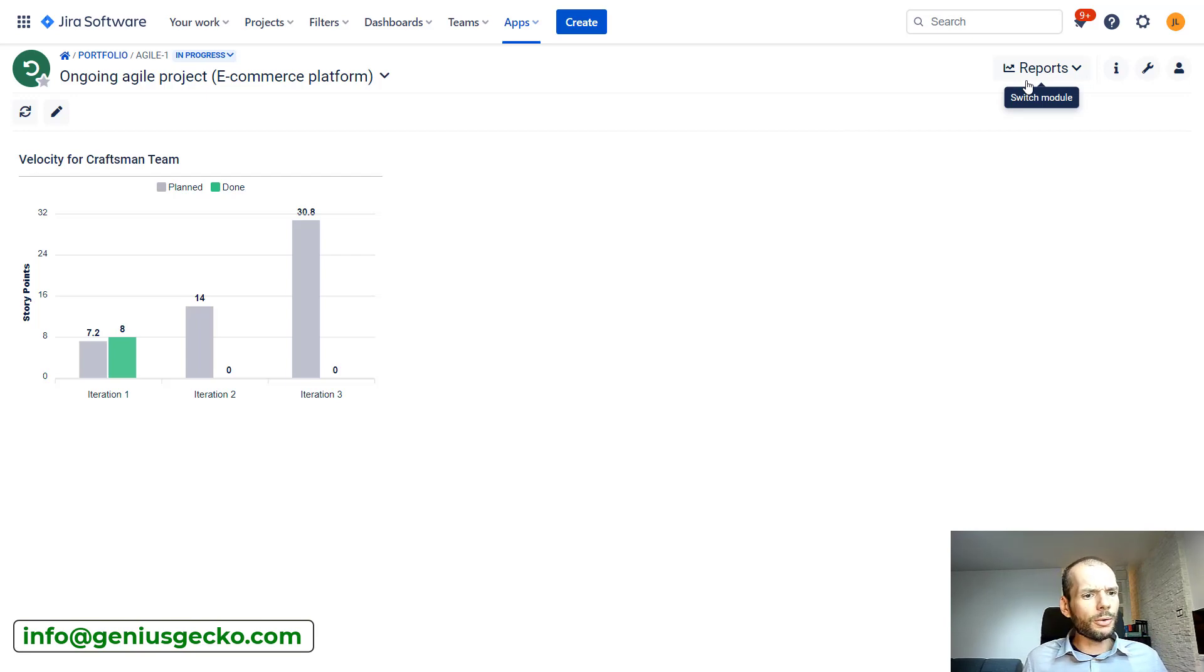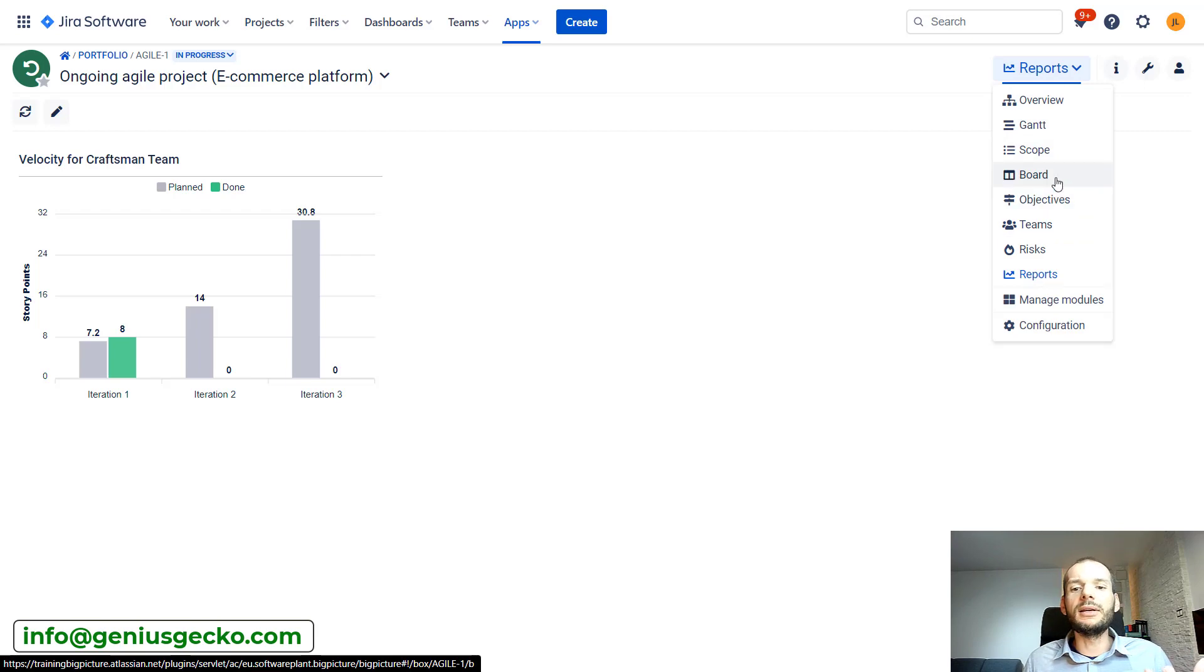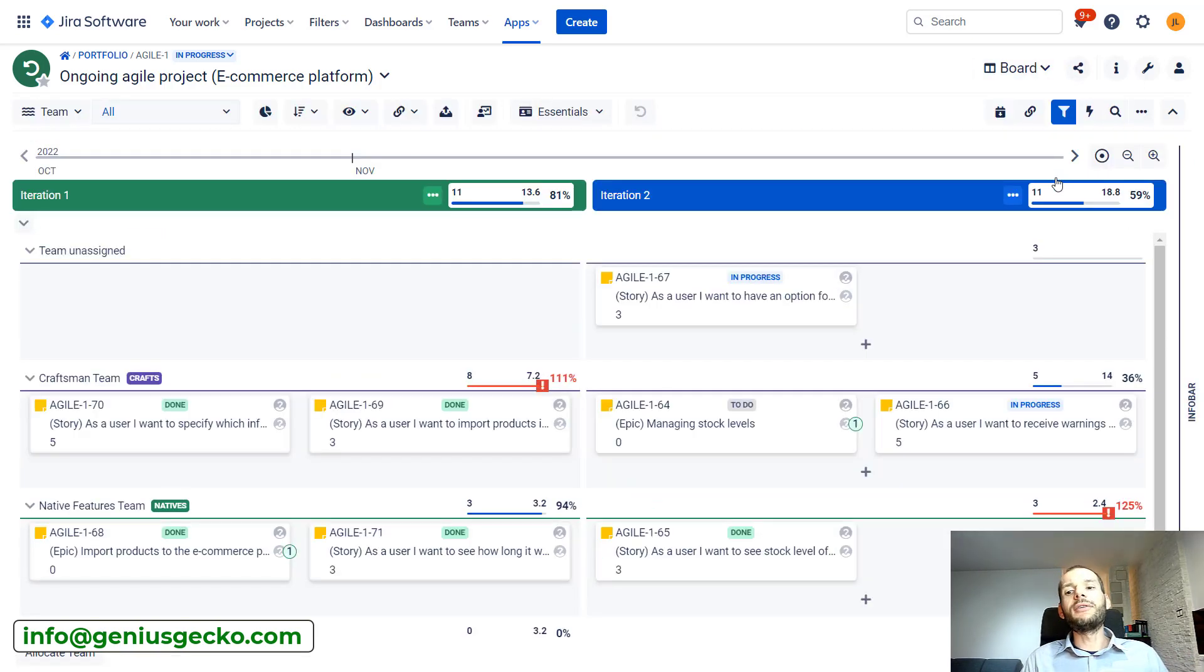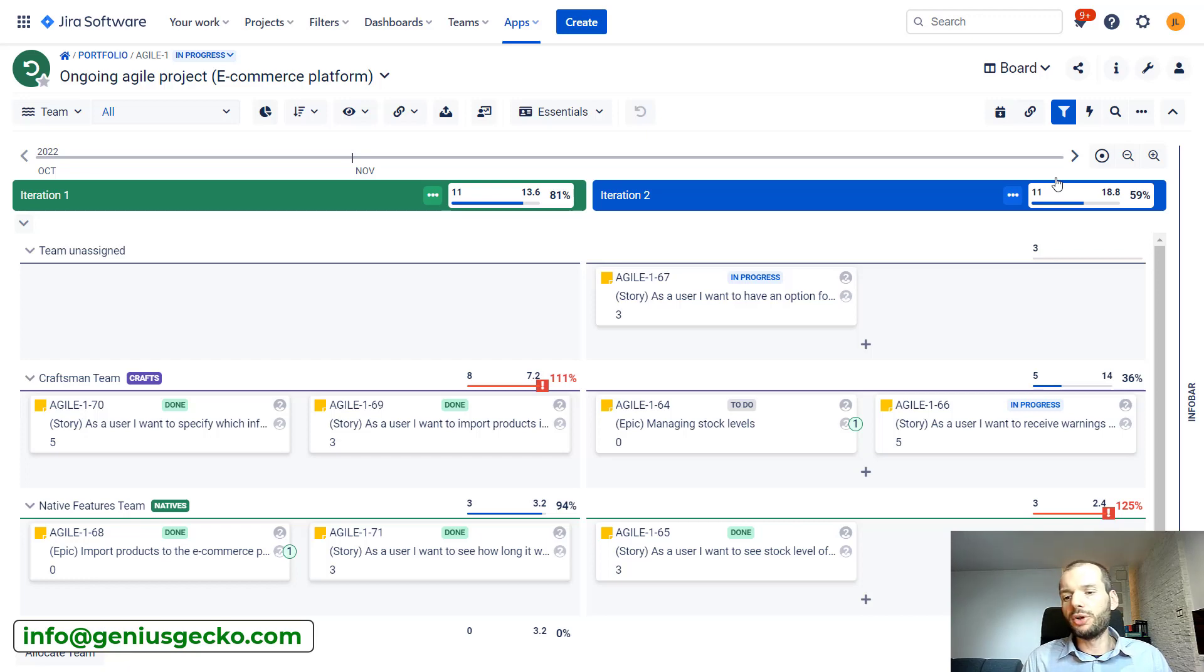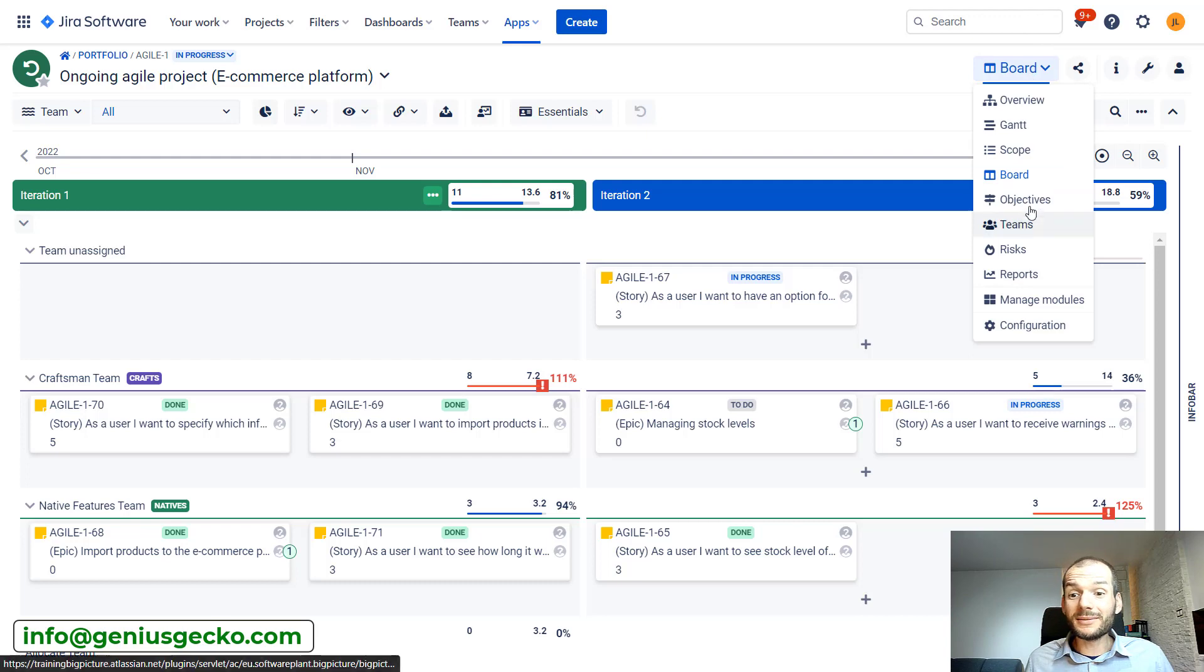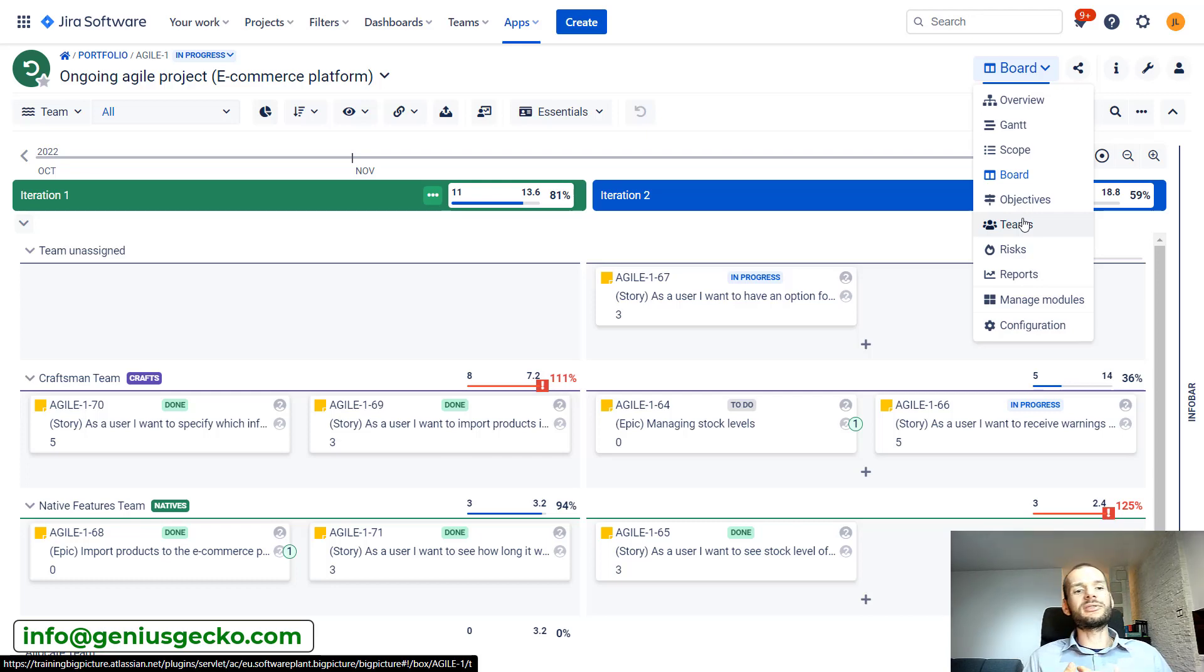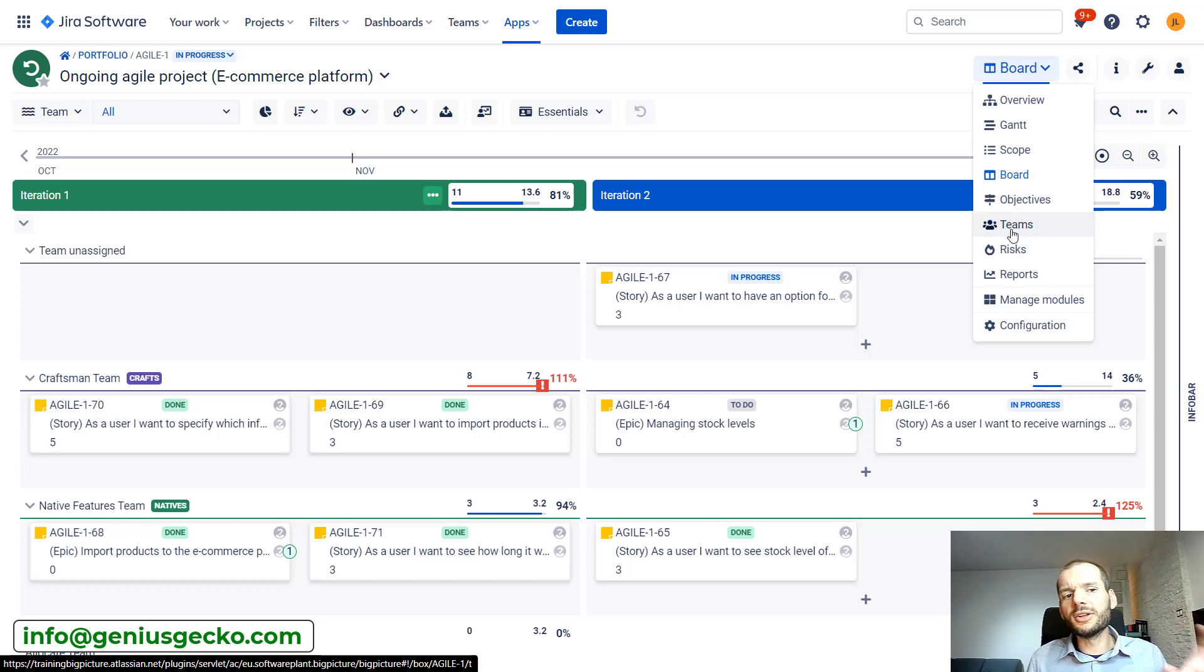So you want to change the capacity. This is pretty standard approach. In Scrum, for example, after each release we can actually check what is the velocity of the team and accordingly modify capacity or accordingly plan the next sprint. This is what you would do. And in theory you could go to teams and try to change the capacity of a team over there. Maybe increase person's efficiency, maybe change workers, but all that has other consequences. We won't get into this in depth, but this is not the best way.